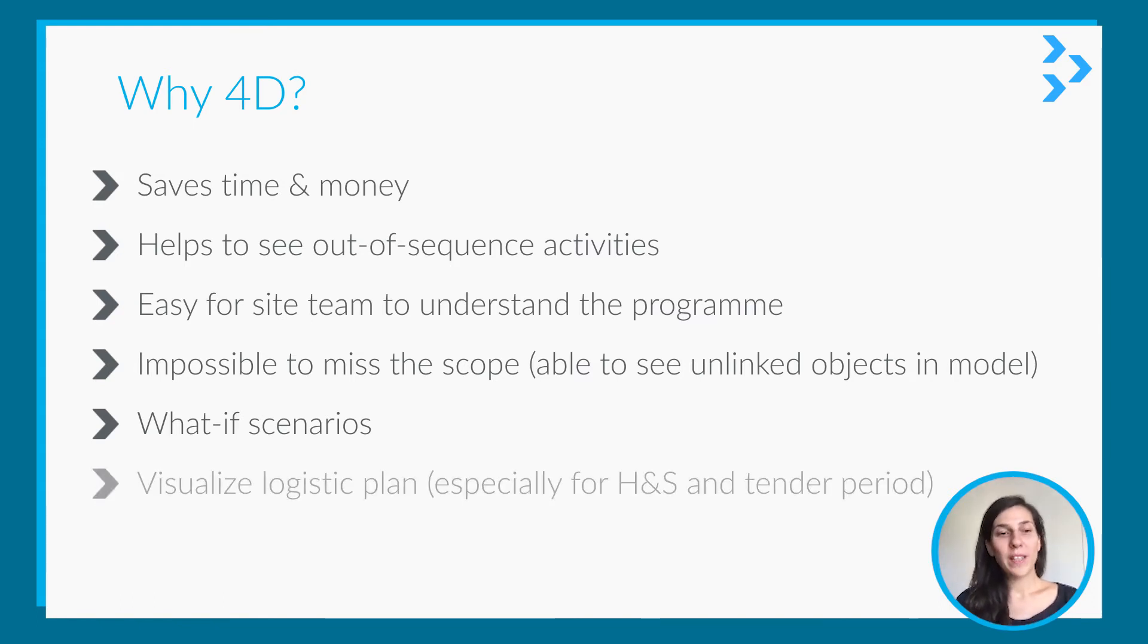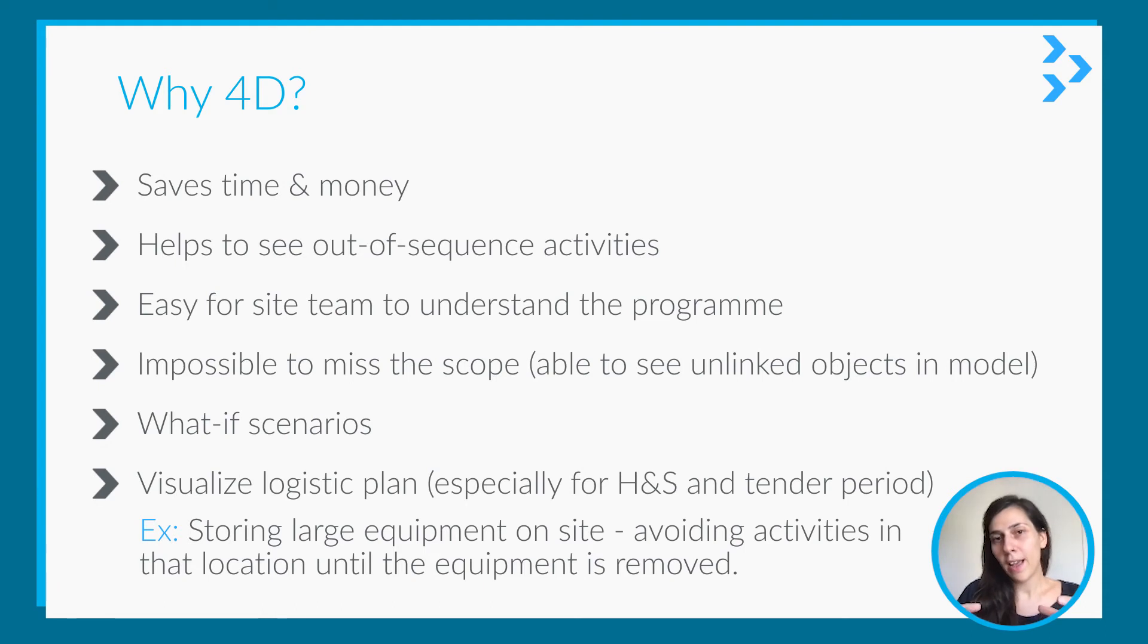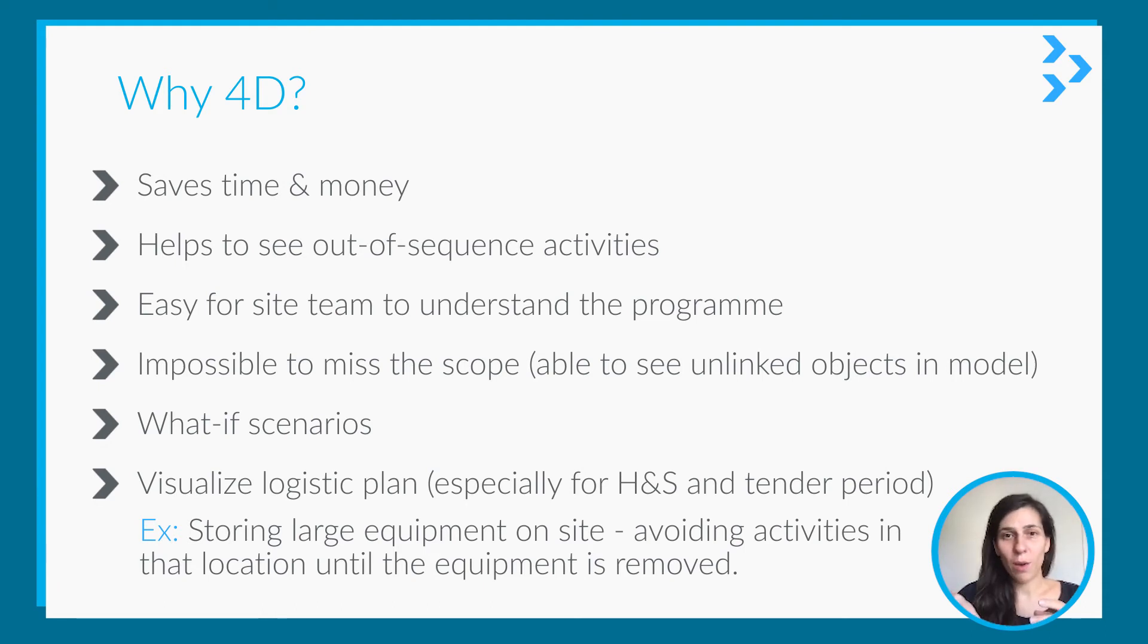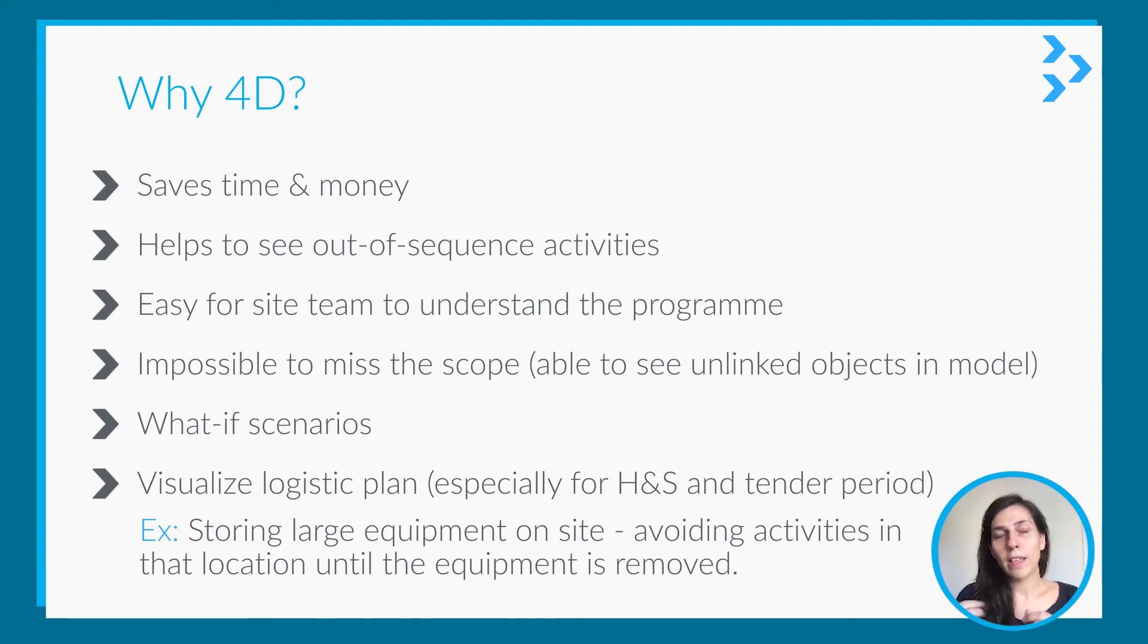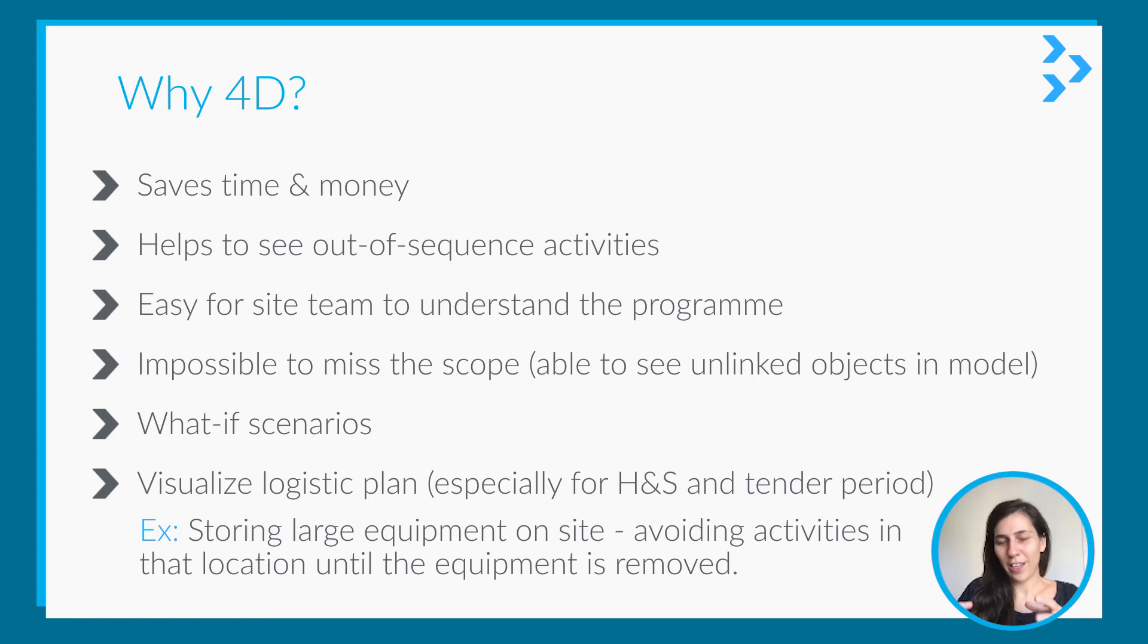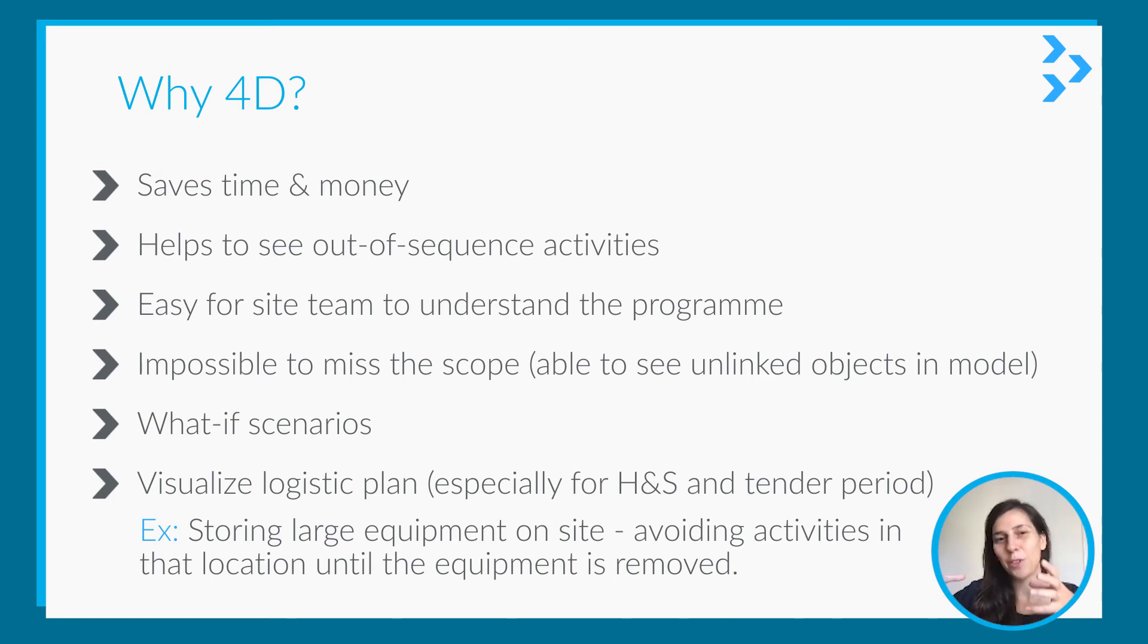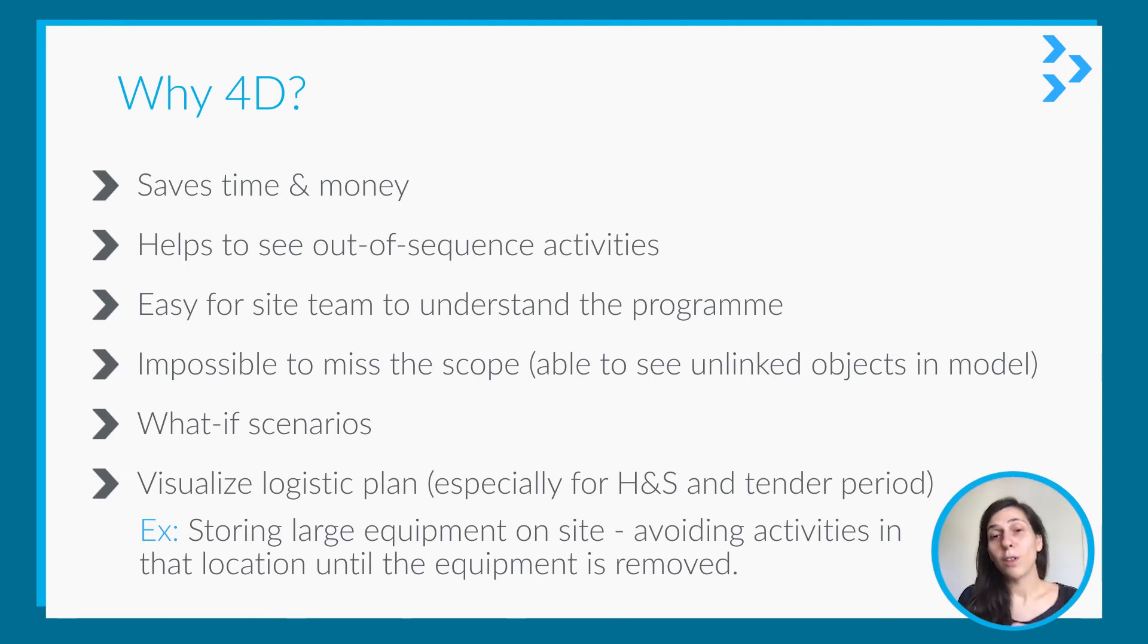It helps you to visualize logistic plan as well. For example, you have a large equipment on site, and you cannot work in that area until that equipment is moved. In the program, it's hard to coordinate it, but when you see it on 4D, you are sure you cannot work in that area—you can see that there is equipment there. So it's much easier if you include the logistic plan in 4D as well.